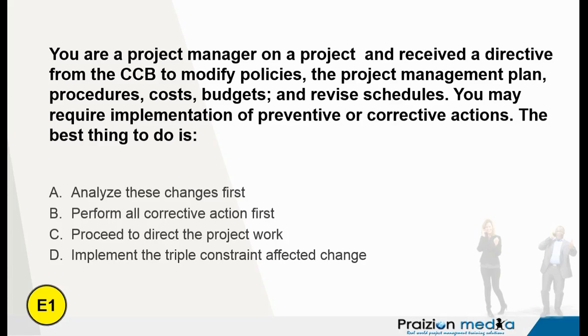Okay, well, I hope you have chosen your answer. I'm going to show you what the answer is in 5, 4, 3, 2, 1. The answer is proceed to direct the project work. Now, if you take a look at analyze these changes first, the first option, well, it's already come from the CCB, so why do you need to analyze these changes?